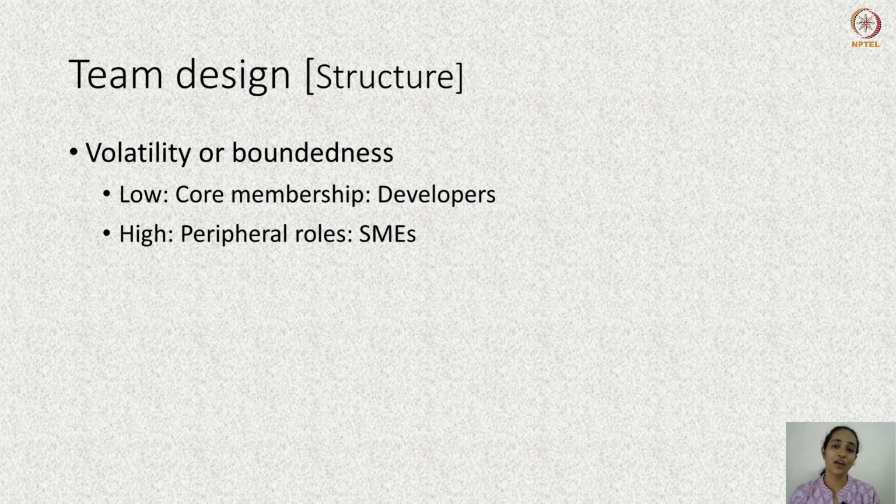And finally, we will find that team members, given the requirements of Agile methodology, it's very difficult for an Agile team to function properly unless it is highly bounded. That is, in Agile teams, you will find that team members do not have membership in multiple teams simultaneously.